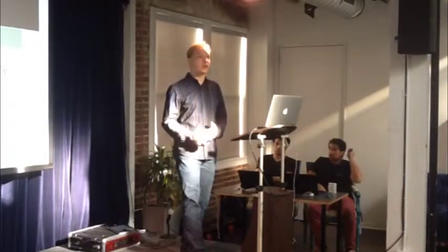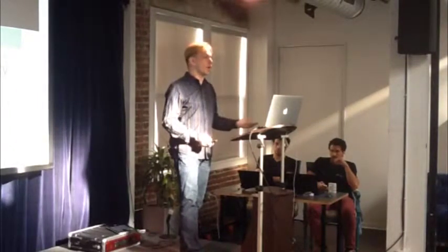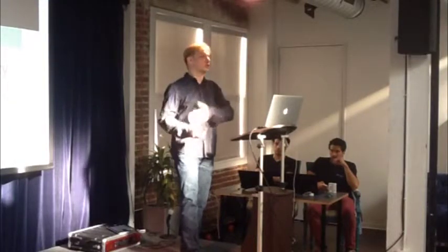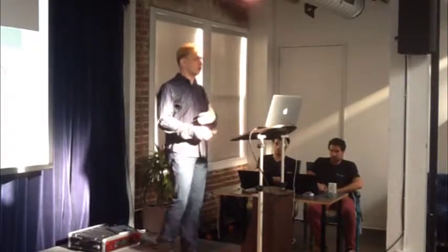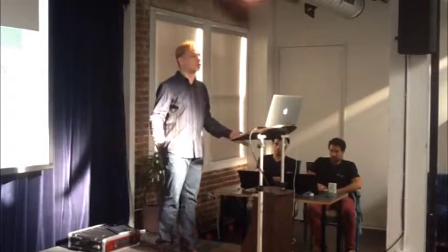That sort of thing happens at least 2 or 3 times in every software project. And the bigger the software project, the more it will happen. So we need to budget for the unexpected technical difficulties because there's really nothing we can do to anticipate them. That's the definition of unexpected.